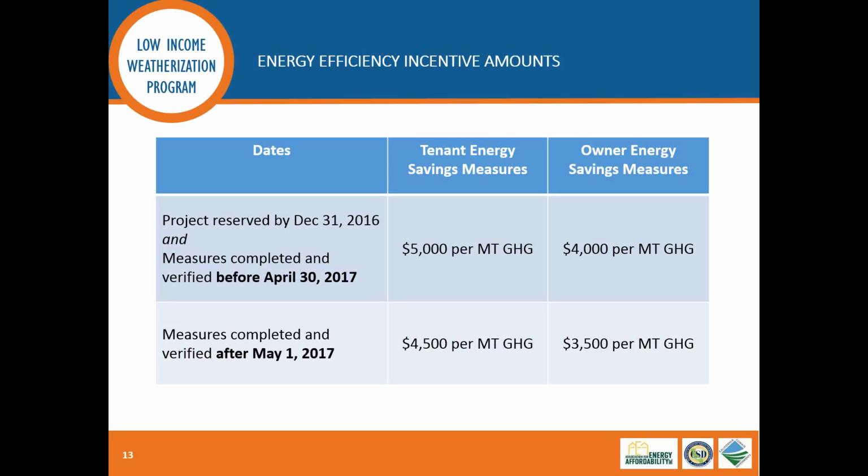And this program's current funding cycle ends after the first quarter of next year. So we're looking for projects that can complete construction by the end of the first quarter of 2017, which is next year. And if you have projects that you know quite well, there's just no way they're going to be completing construction by the end of first quarter of next year because they're going through tax credit resyndication or other processes, there is limited funding available in a subsequent round of funding for projects that complete after the 1st of May of 2017. And that funding is limited.